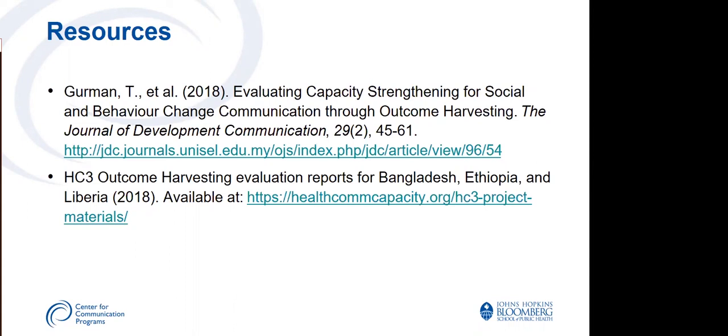Great question. Lucy, do you have anything to add? I guess I would just say that we addressed a similar challenge moving forward into the subsequent projects by integrating outcome mapping in as well, which, as Heather mentioned, outcome mapping and outcome harvesting developed to complement each other, and while they're not always used together, we found that doing outcome mapping, like Tilly also just said, helped us figure out what our expected outcomes were, and then to put in place the steps or mini milestones towards the larger outcome.